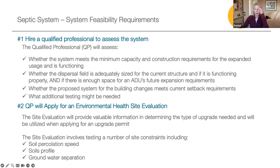Regarding hiring a county-approved qualified professional: I will drop a link to the list of qualified professionals in the chat at the end. Your qualified professional will check if your system meets the minimum capacity and requirements for an ADU and confirm that it is functioning properly. They will check if the dispersal field is correctly sized and functioning properly, and if there is enough room for a future expansion field. They will check if the proposed system for the ADU will meet the current setback requirements, and finally, if additional testing is needed.